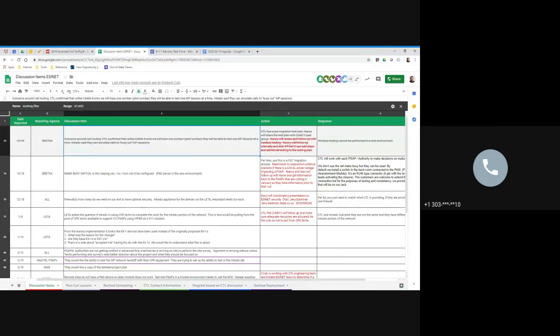And we're changing that destination route once they've already been handed off to the selective router and repointing them at that point. So that's why there's no real way to test that in a pre-migration scenario, because we can't really redirect a wireless call without potentially impacting production calls during that pre-production time.